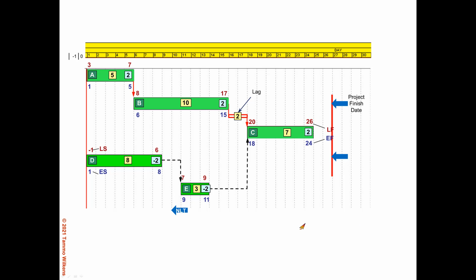So what we have now is a longest path that is not critical and has nothing to do with the criticality of the project. But we do instead have a critical path here that ends somewhere in the middle of the network. It has nothing to do with the longest path, but the criticality comes from, in this case, the not later than constraint.